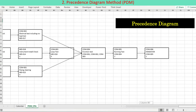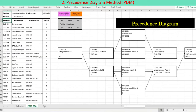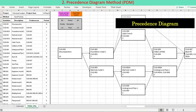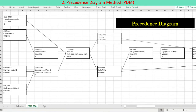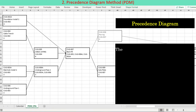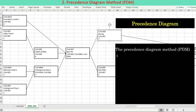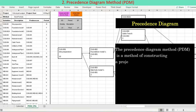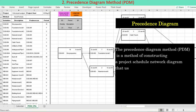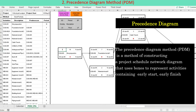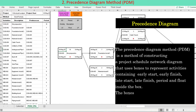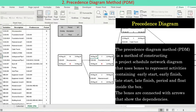The Precedence Diagram Method, PDM, is based on elementary Excel functions in accomplishing the critical path analysis. PDM is a method of constructing a project schedule network diagram that uses boxes to represent activities containing early start, early finish, late start, late finish, period, and float inside the box. The boxes are connected with arrows that show the dependencies.